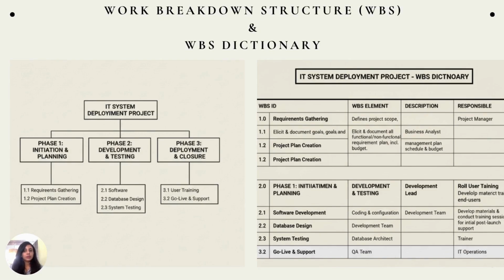We will also need to consider the timing of the procurement of the resources. For example, if it's a fixed rented cost, you can't keep the rented things for a long time for no reason. It will increase the cost. It is also known as just in time. Note this term down. This is a new term. This might come in your exam directly or indirectly. So understand the term just in time. It means you cannot keep the resources for a very long time.